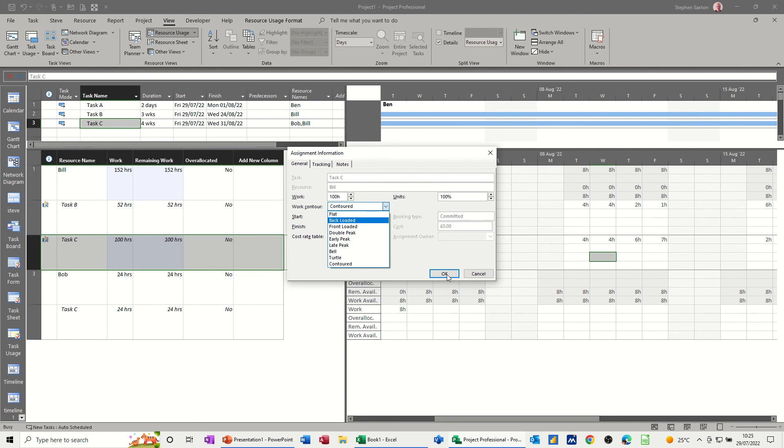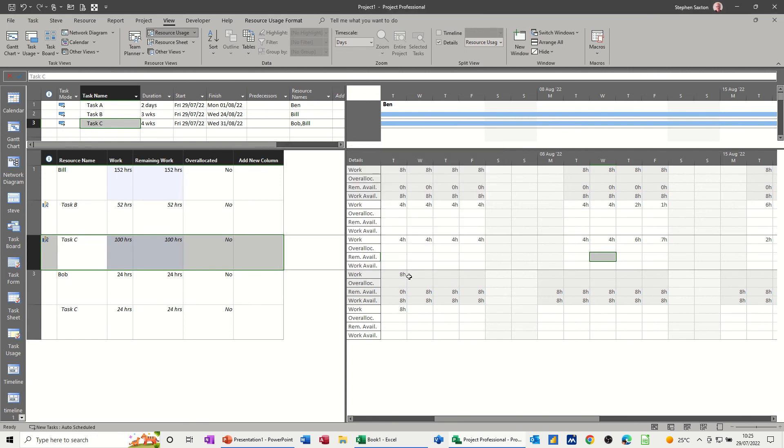And what I mean by contour, click OK to that, is this, what I've just done there. 4, 4, 4, 4, all the way across and up and down a bit. So, for example, a front-loaded project work resource would have probably 8, 8, 8, 8.